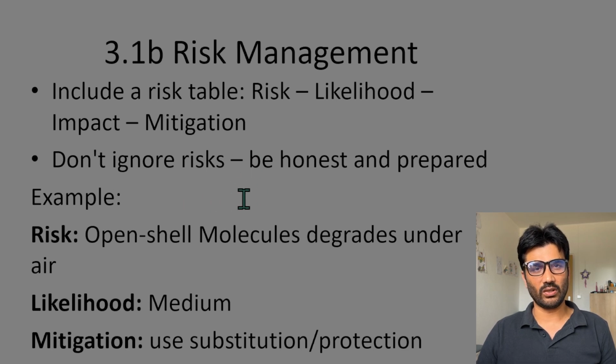So you should be honest and prepared with the backup plan here. You should give a mitigation plan. For example, when I was writing, I was synthesizing materials which have unpaired spin, and they are likely to react with air. They're not that air stable, so although the risk seems higher, I put it as medium here, and I gave the mitigation strategies.